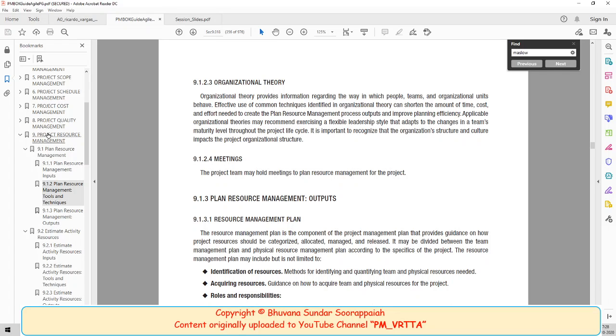Then comes 3-point estimation, which is the most robust, because 3-point estimate basically uses the principle of statistical accuracy. Statistical accuracy means the more number of samples, more number of data points you have, the more reliable your final estimation is. So from a population of 1000, you pick 10 samples, and you pick a sample of 100. The data you get from 100 samples will be more reliable than the data you get when you have only 10 samples. So getting 3 carefully chosen and placed data points will give you a much more accurate estimation than when you randomly pick up a point.